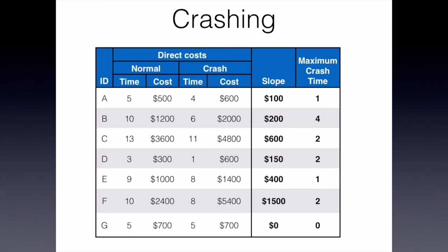So what we can do is look at all the critical path activities — in fact, all the activities in our network entirely — find out what that slope value is, what the cost is per time increment, and find out what the maximum crash time is. Going from task A, it can be reduced a maximum of one day for a cost of $100, whereas task B could be reduced by up to four days for $200 per day. Task G cannot be reduced no matter how much money we pour into it — it's going to be five days and five days only.